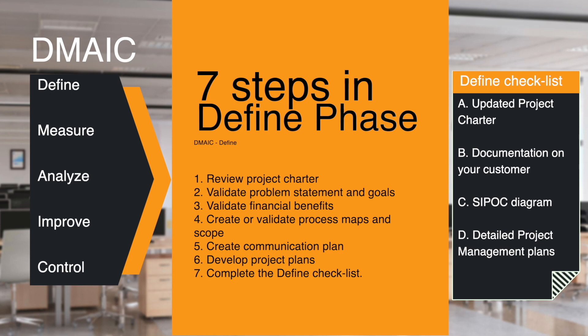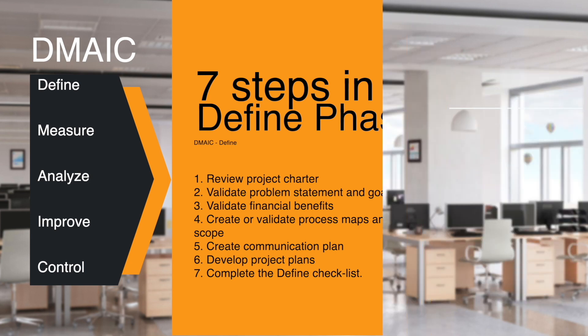Item C: SIPOC diagram. Item D: Detailed project management plans. You should have a more detailed schedule of activities, for example using a Gantt chart. You should get a list of stakeholders impacted by the project and their expectations and concerns. Also include a communication plan, risk management plans, and identification of barriers or obstacles.